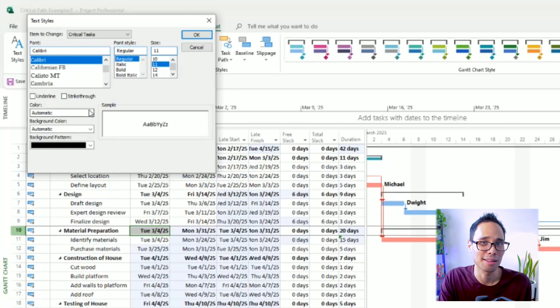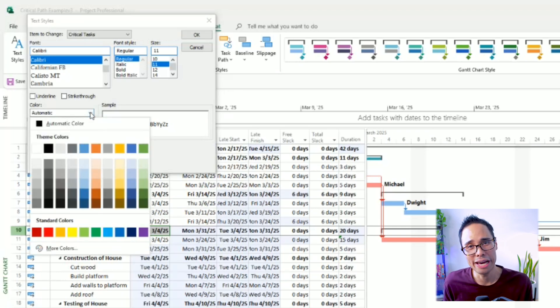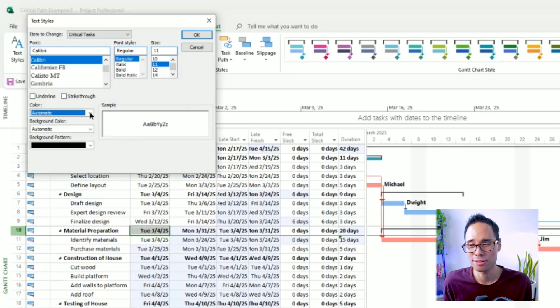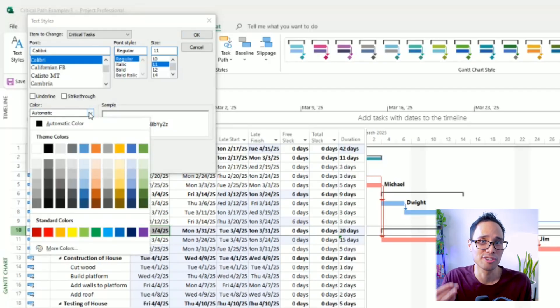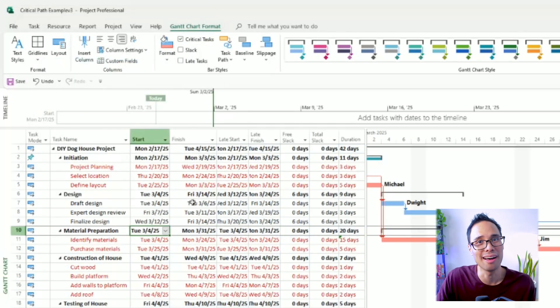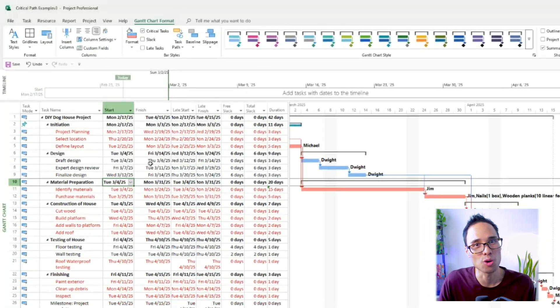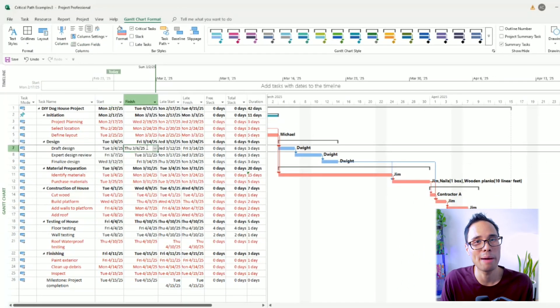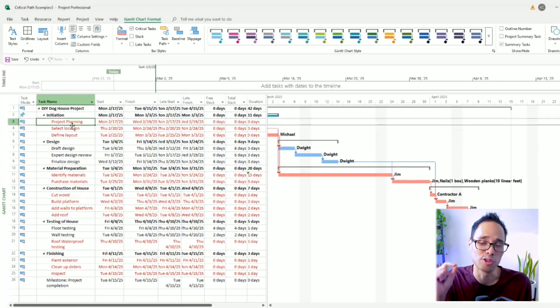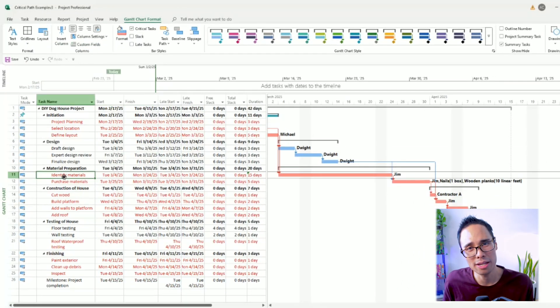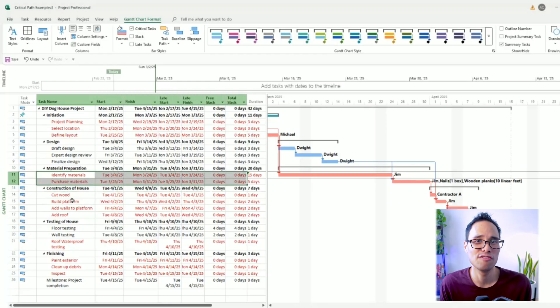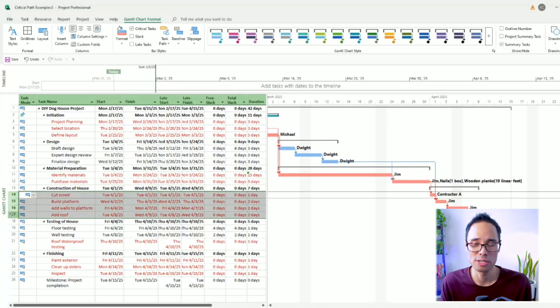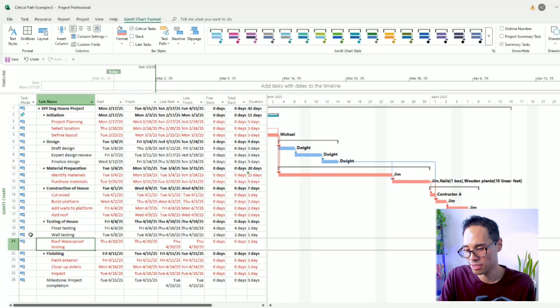Let's change the text color so it's red. To do that, move your mouse to the drop down menu for color and pick the dark red color. And voila! This one shortcut automatically color codes all of your critical path tasks with a red color so you can easily visualize which tasks are critical path and which ones are not critical path.